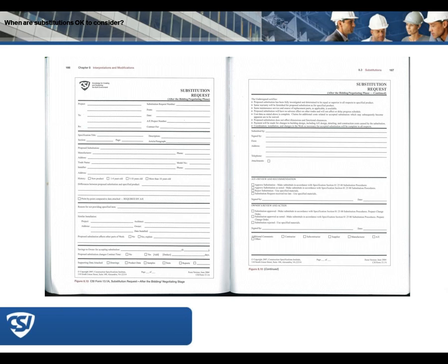That the proposed substitution will have no adverse effects on any of the trades. It's not going to take 9 more months to get this curtain wall system made somewhere else and thus negatively impact the delivery of the project. It won't affect or delay progress at all.